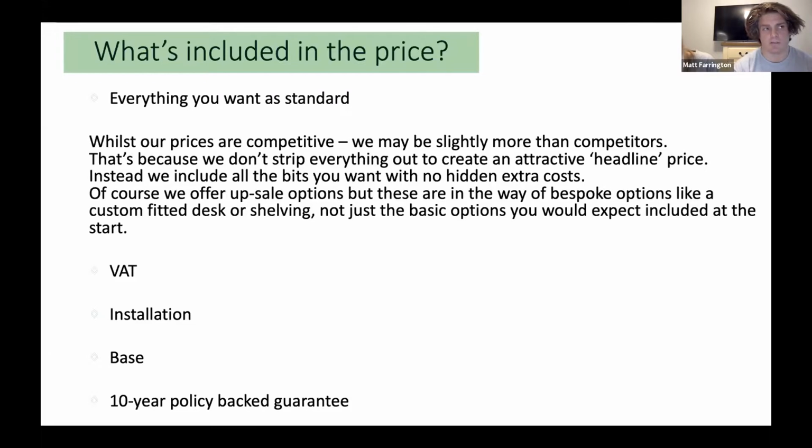The other point to mention on the 80 to 100% constructed offsite, the 80% would be where the modular panels are fully constructed, right down to the detail of where the client would like sockets to be located. These are already preset and cut into the relevant panel number. The siting of windows and everything associated with that can all be taken into account off-site to minimise the impact and the disruption caused on site as well.